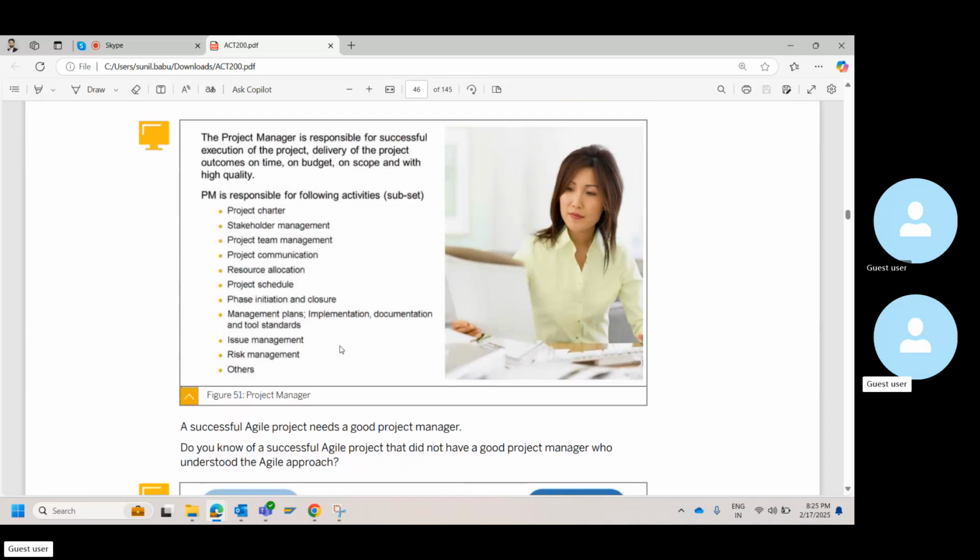What's the responsibility of the project manager then? It's his job to integrate all the team members. Because one SAP project will have one SAP project manager. If it is very small, maybe the project manager will be involved in 2 projects maximum. If it is a greenfield, for sure that project manager is going to take care of one project only. If it is a larger scale, you will have a project coordinator with you.